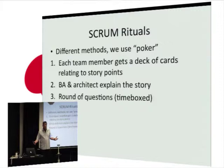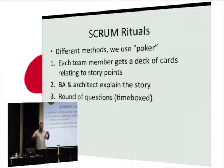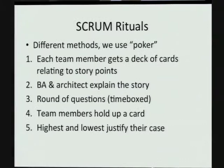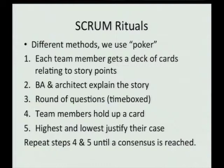Each team member gets their deck of cards. The BA and architect explain the stories, and there's a time-boxed Q&A — usually 10 minutes per story — where the team dives deeper into requirements, discussing how to implement it and what systems to interface with. Then all team members simultaneously hold up a card for what they feel the story is worth. The highest and lowest estimates justify their cases, and you repeat until you reach a consensus — the goal being a fairly good team estimate of the work involved.